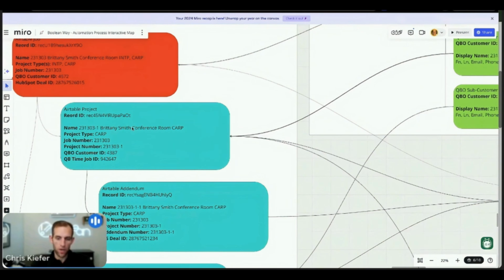So every single project, we can tell you what your profitability is because all hours were assigned to the project and all expenses get assigned to projects as well. Then we can roll that up and say, here's your profitability for each project. And then we can sum those and tell you what your profitability was at the job level.